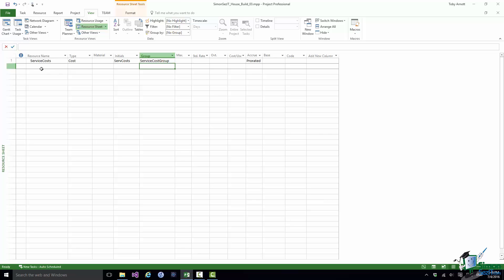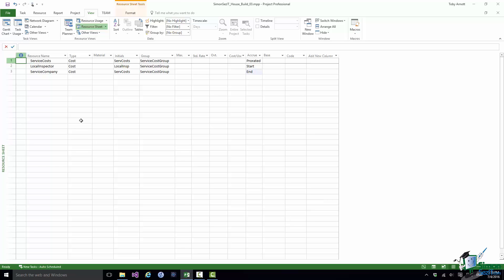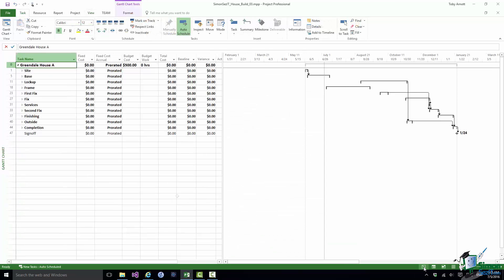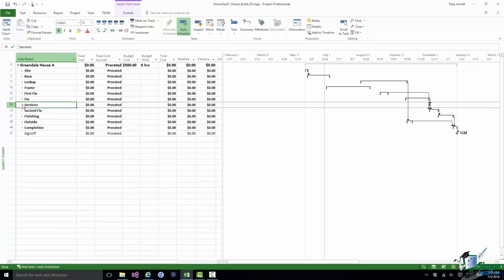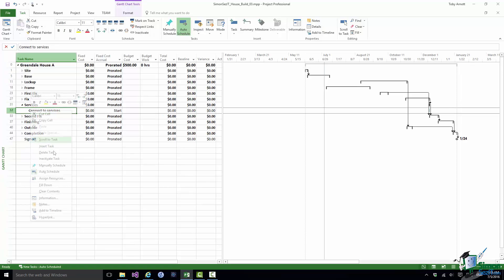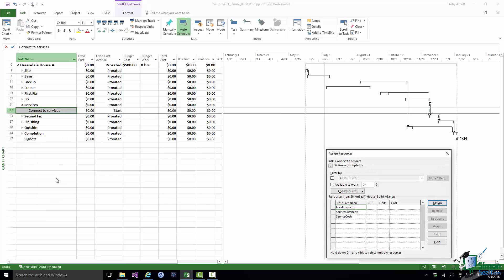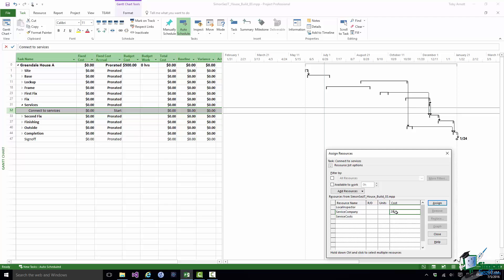Let me set up these other two cost resources. These are cost resources but of course they're not budget cost resources. I've set up the local inspector who is going to inspect the build and hopefully give it approval. And I've set up the service company who will be connecting the services to this new build. Let me go back into the Gantt Chart and I'm going to find Connect to Services and assign one of the resources to that. That's Service Company and I've discovered that the cost of using the service company to do the connection is $295.